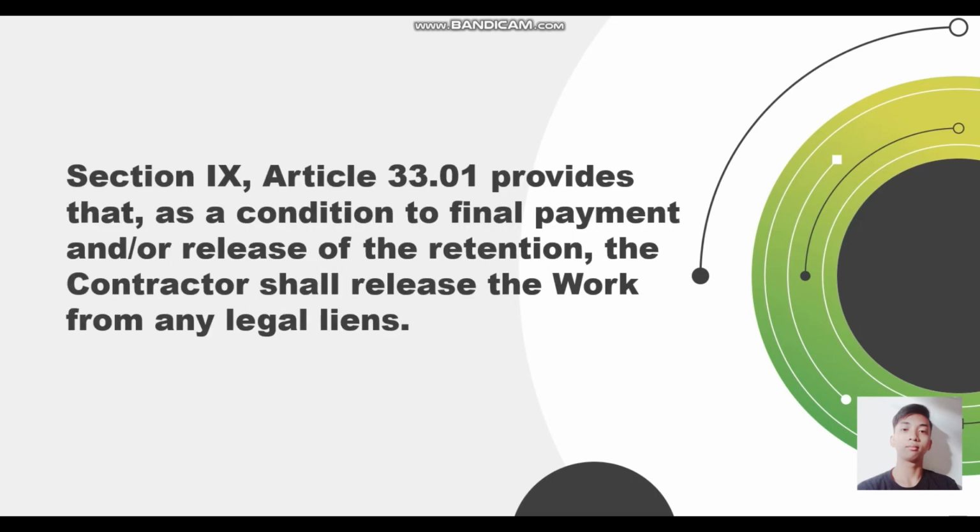According to Section 9, Article 33.01 provides that as a condition of final payment and/or release of the retention, the contractor shall release the work from any legal liens.